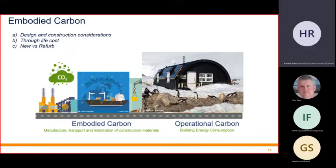But that then leads to a challenge around being able to use the local workforce. We're looking to perhaps get them to work in non-traditional mediums, and do they have the skills to adhere and construct to the necessary tolerances? And if they don't, are we bringing in contractors from the UK? We're shipping them down, adding to the carbon cost of transport because we're bringing people down. What happens if an asset breaks? Do we have to fly people or parts halfway around the world?